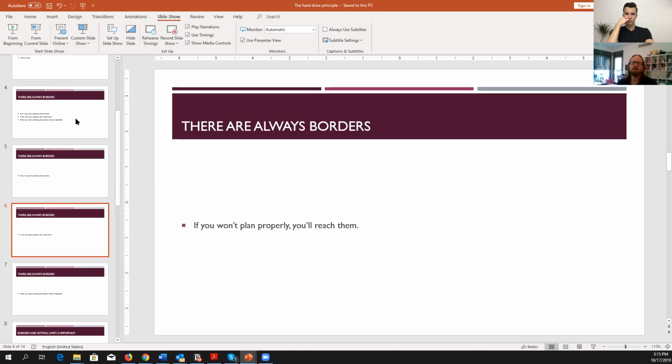I never saw a project that ends according to the deadline if it was not broken down to a specific Gantt, and even specific Gantt, with buffers in the Gantt, you overshoot there, you always misfire. So you need to take serious buffers, sometimes 1.5 times, sometimes 2 times the amount of time it takes to do the task.